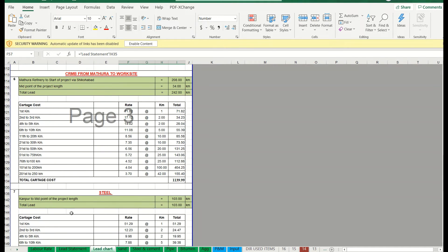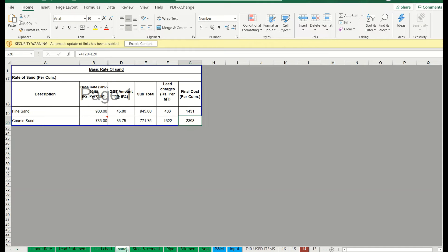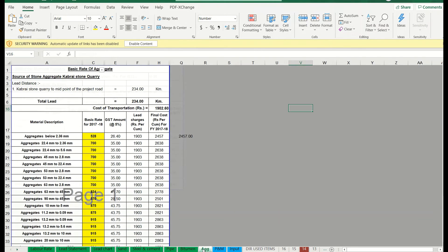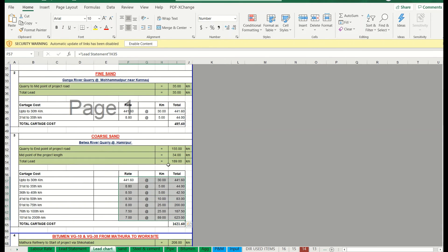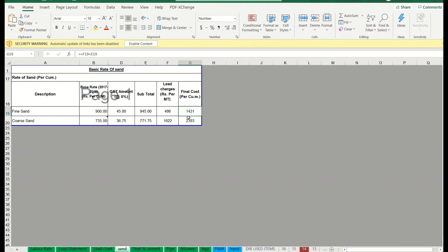There are separate sheets: one for sand, steel, cement, pipes, bituminous aggregate. For fine sand, the base rate is 900 rupees per cubic meter. Add GST to get a subtotal of 945 rupees. To this 945, we add the lead charges — 486 rupees (rounded from 485.60 taken from the lead chart). Total comes to 1431 rupees per cubic meter. This is the basic rate analysis calculation for fine sand.